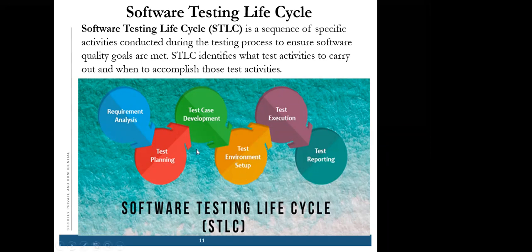Before starting your test case development, you can start the test environment setup also, because it is independent of test case development. Once the preparation of test case development and test environment is done, then comes the test execution phase.